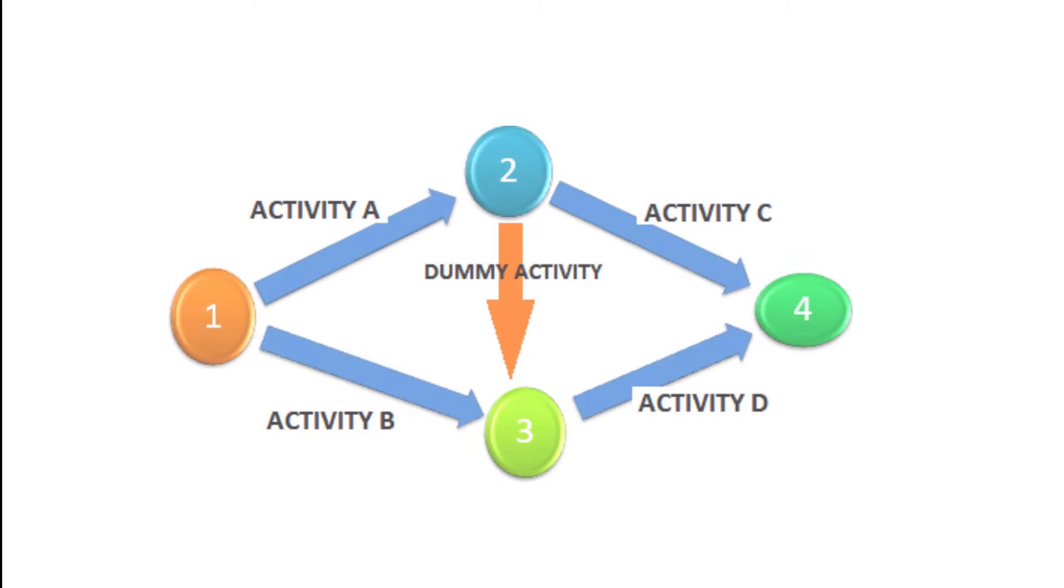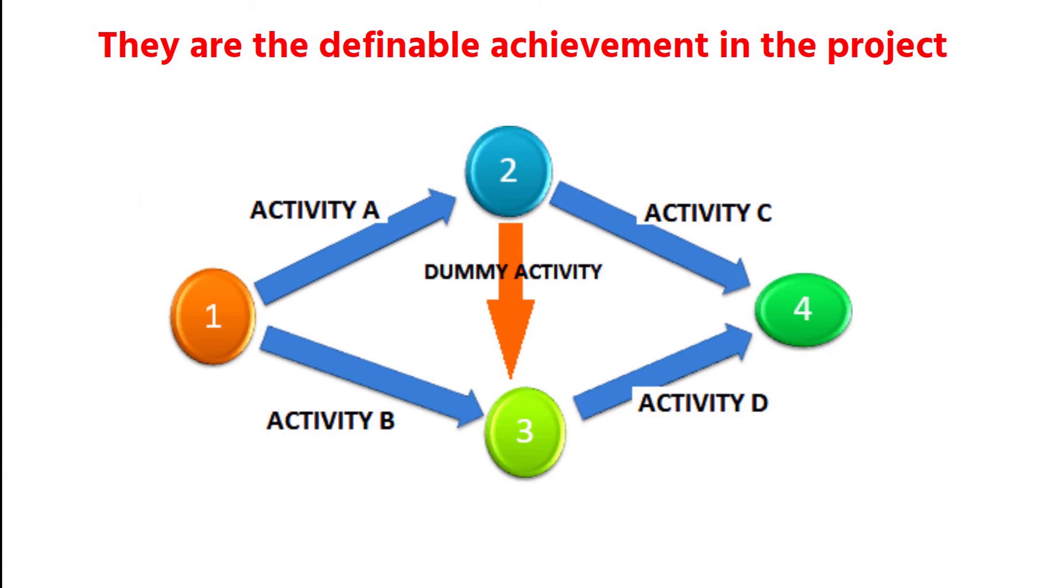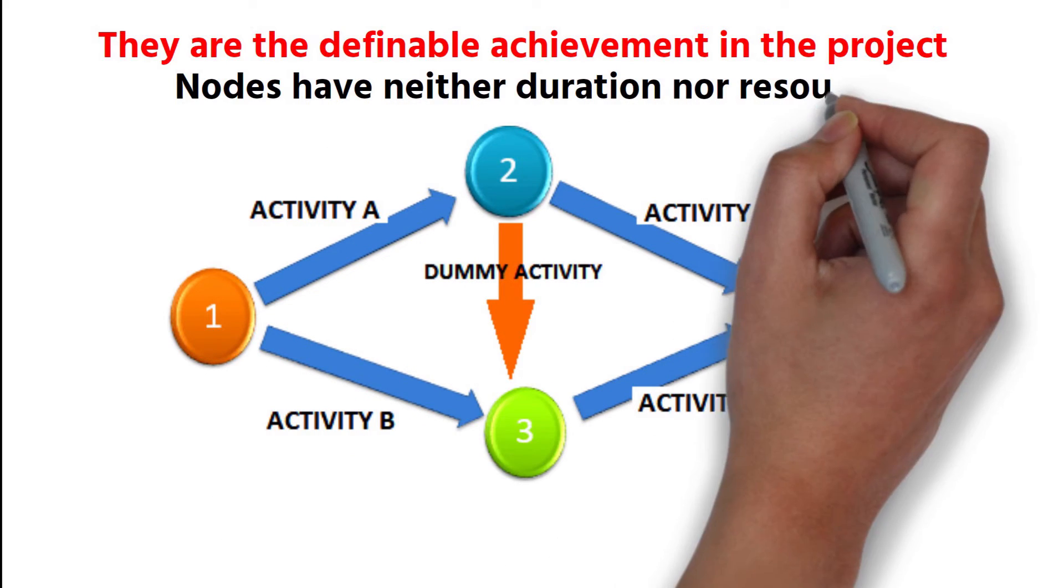The circles numbered 1, 2, 3, and 4 are the nodes of this network system. They are the definable achievement in the project. Nodes have neither duration nor resource.